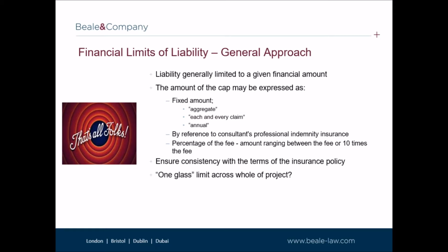Finally, in relation to financial limits of liability, we're seeing an increase in consultants in their standard terms and conditions seeking to achieve a one-size limit of liability for all losses arising across a project. The limit in the standard T's and C's would seek to deal with all losses under the appointment, collateral warranties, let's say reliance letters, and in respect of negligence claims from third parties who are not the subject to any limit of liability because there is no contract with the consultant.